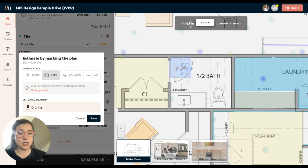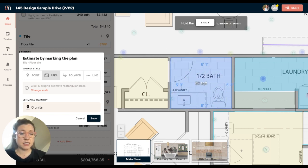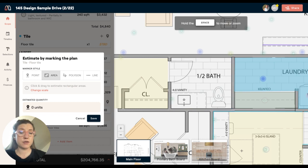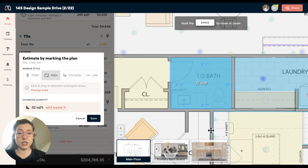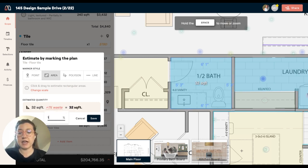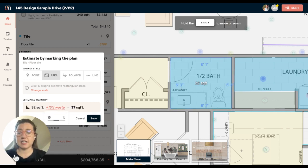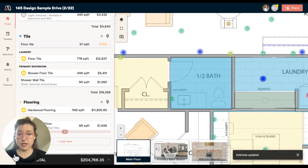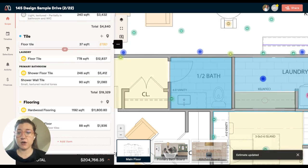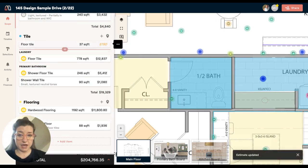I've already set the scale for this project. So when I drag and drop this, it's going to show me that I have 32 square feet of floor tile in this bathroom. I can quickly add the waste on that and then save. I've got the floor tile in this bathroom.